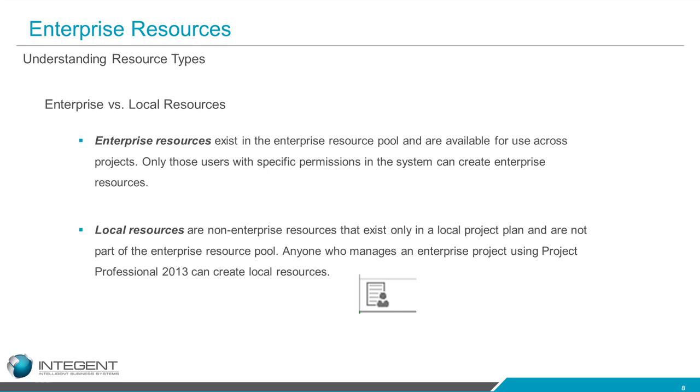you're using. It would also provide the ability for other project managers or resource managers to go to Resource Center, which I'm going to show you in just a little bit, and visualize and see how that resource is being utilized across multiple projects. So if it's an enterprise resource and the project has been published, you would be able to see how their availability is being decremented based on all the projects that they're being assigned to directly right in Resource Center. A local resource, however, that visibility will not be in Project Center.